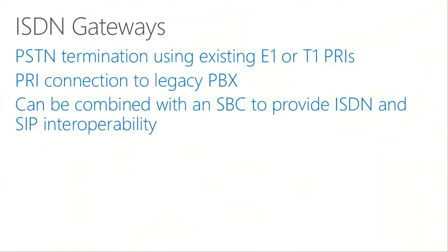So this is where those platforms provide even more value, where you can say, okay, I've got a platform of 4 devices that are ISDN gateways and SBCs, and I want to take in all the existing T1s I have today into those gateways and provide like-for-like service, but then maybe as part of a second phase of the project, I want to bring in some SIP trunks and then port over the DIDs. So these devices can provide a middle ground throughout that entire project life cycle.